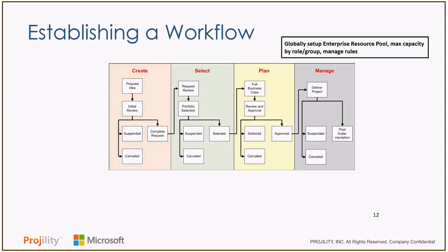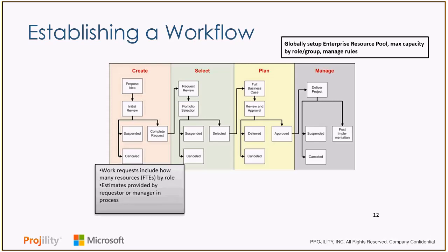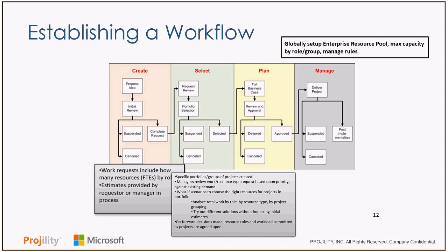When it comes to demand management, what we want to do is get a work request in based off of how many resources I'm going to need at an FTE level by role. So this is the resource management component of it. And then we want to get estimates that are provided by either the requester or the manager in that process. So we have to capture what that forecasted workload is going to be for potential resources that may do the work.